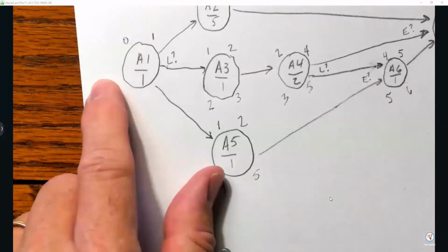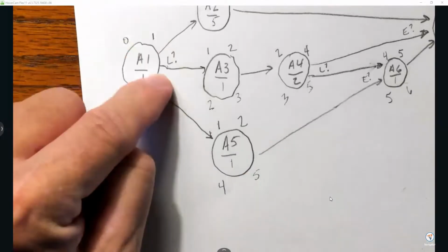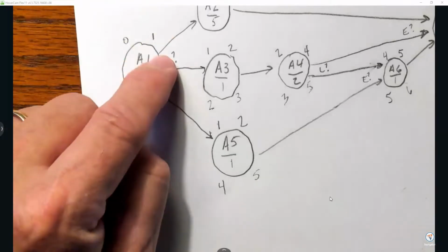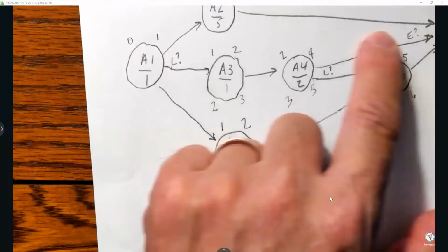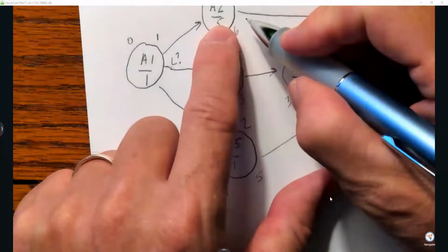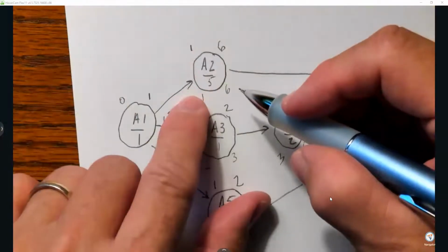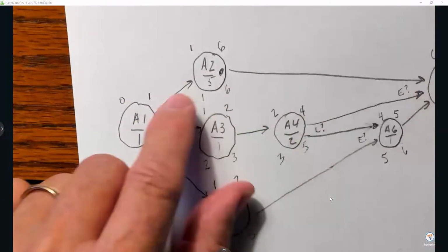All right, so I'm kind of cruising along. I'm going back to this one, but I have to look at all 3 of these and decide which L is the lowest or the smallest. So this one is 6, and I'm going back there, and I'm going to put the 6 in. 6 minus 5 is 1, and guess what? These line up, so I know that that's on the critical path. So I'm just putting my dot there so I know.